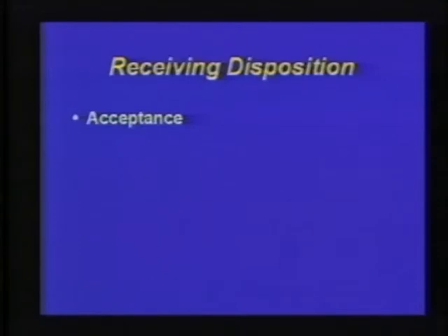As an example, if there's a reject, you may want to return the entire shipment to the supplier. Now, this means that purchasing is going to have to get on the horn and start expediting immediately for a replacement shipment. This again depends upon whether that lot was for a particular planned maintenance work order, or is it for, let's say, replenishment of store's inventory for future unplanned requirements.